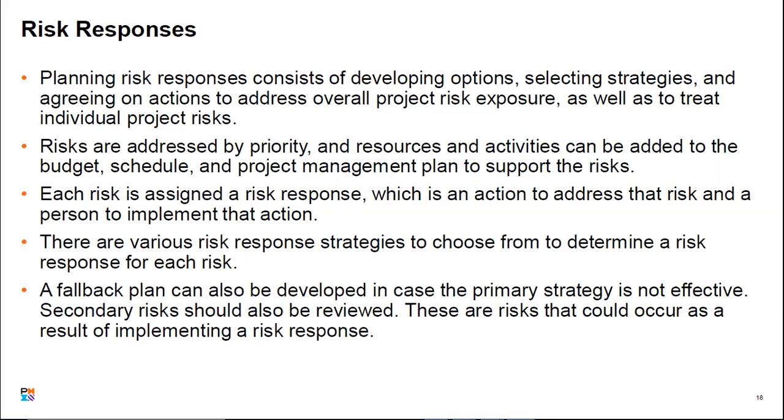Each risk is assigned a risk response, which is an action to address that risk, and the person to implement that action. We'll talk about the roles and responsibilities of your project team initially. So you need to assign a resource, an individual, to implement the risk response that you've prescribed for that particular risk.